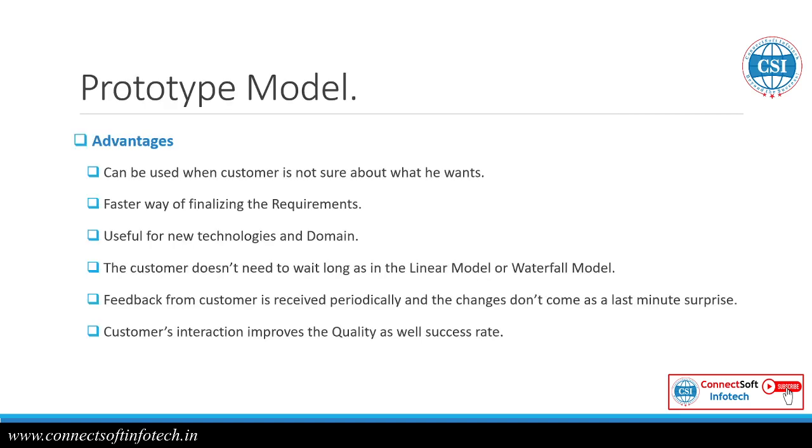Okay, so what are the advantages of this model? It can be used when the customers are not sure about what they want. Okay, sometimes the customers are not sure, but when will they become sure? After seeing some demo, after seeing some prototype. Okay, then they can give the requirement again. So it's a faster way of finalizing the requirement. It's a faster way. It is also useful for new technology and domain.